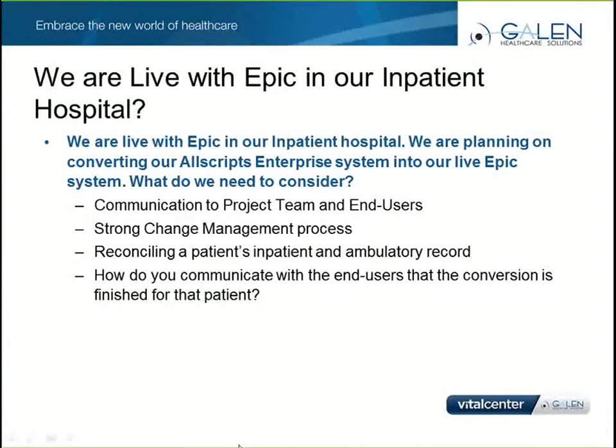Another item to consider is during the actual conversion. How are you going to notify a provider who is in a chart that the conversion is complete and they should reconcile the chart? It's hard to know how long a conversion will take, and providers shouldn't have to guess if the chart has been fully converted or not. One way other organizations have done this is to add a dummy medication record to the list that states that the conversion is complete. Then the provider knows that they need to work on reconciling the chart to clean up any duplicates or outdated information that was not taken care of in Allscripts.